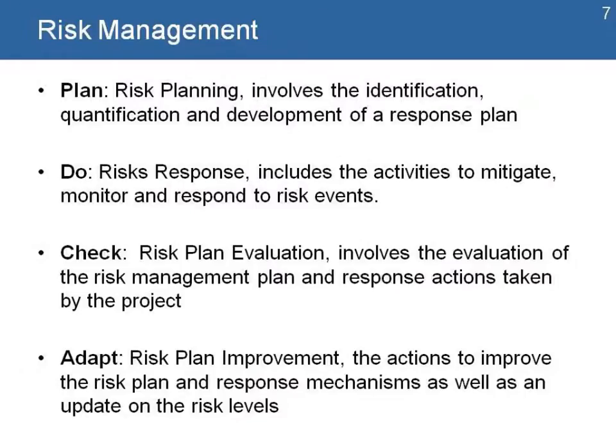Let's look at that in more detail. During planning, we involve the identification and quantification of risks and development of a response plan. This is the place where we identify all the potential risks and we create a plan to respond to them. In the step of doing, the risk response includes activities to mitigate, monitor, and respond to all the risk events.